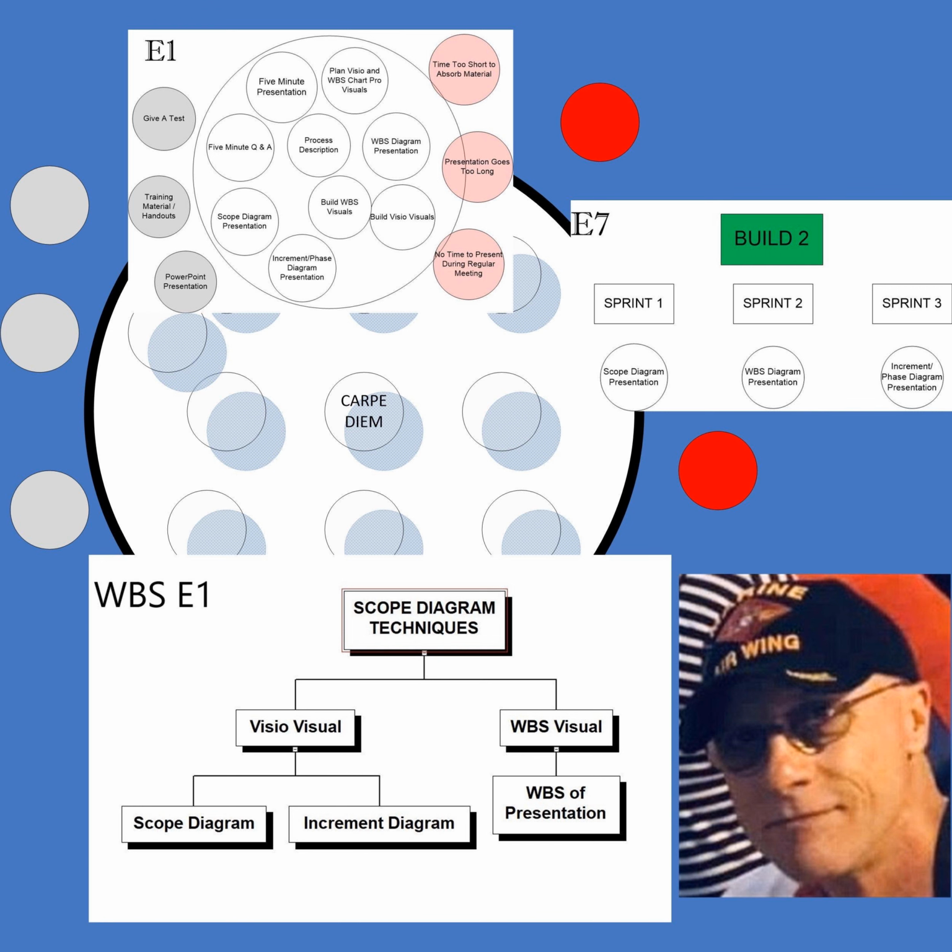They had to list their personnel. Who was going to be there when we turned on the system, when we put it in place, plugged it in, and turned it on? Who was going to be there to turn the application up, to turn the system up, to turn the power up? So they had to list all that, and figure it out way in advance. Imagine during the move, you shut down, and now you're not sure who's supposed to be there for a certain application and who was going to turn it up, and somebody didn't show.